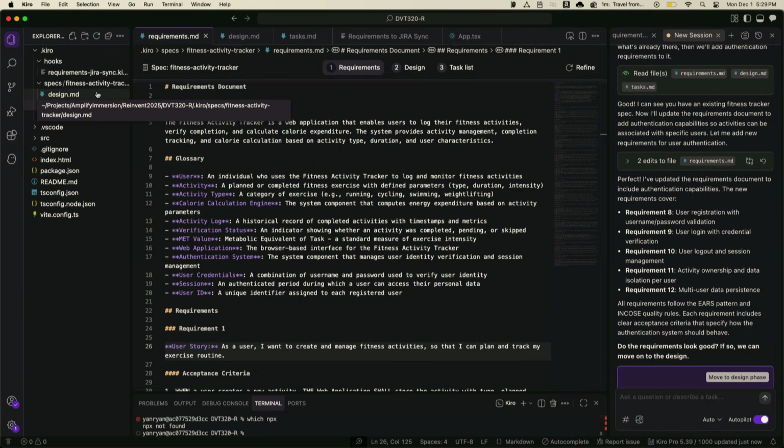Generally speaking, what I would do is create another spec there. So that spec is done, it's finished, we're going to put a bow on it, we're going to slide it over to the side, and now we're going to create a new spec for this new thing, whether it's a change or a new feature. I generally try to treat my specs as kind of contained entities.